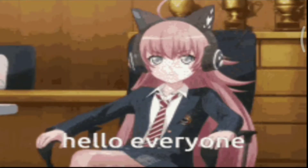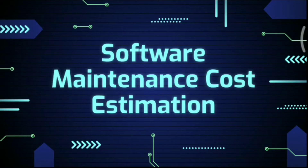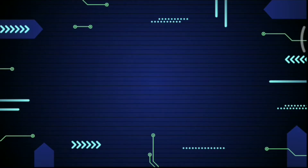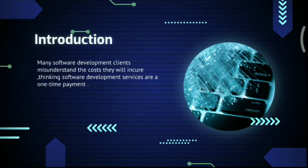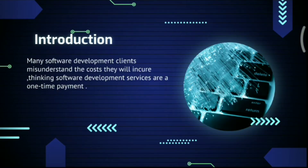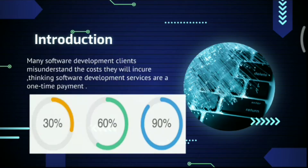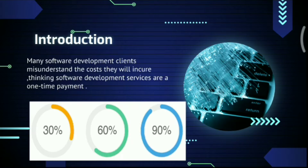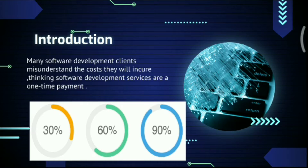Today our topic is about Software Maintenance Cost Estimation. Many software development clients misunderstand the cost they will incur, thinking software development services are a one-time payment. However, there have been some cases when software maintenance costs made up to 90% of the whole software development cost. Due to the fact that costs were underestimated, the budget was violated and in some cases the project had to shut down.